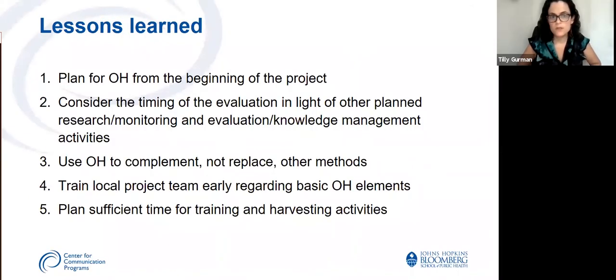So I wanted to leave you with just a few lessons learned, and some of these will sound similar to some of what you've heard earlier from Lucy and from Heather. For us, it was a big learning that ideally we would have done outcome harvesting from the beginning of the project. We didn't come to outcome harvesting until the end, but we all agreed that it would have been of great value to start from the beginning, looking for these outcomes. I think especially to then be able to make mid-course changes in the project.